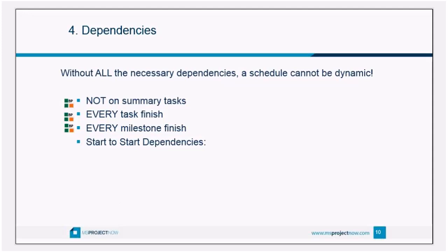You want to make sure that every finish date has a dependency on it. The only exception is summary tasks and the very last task in the schedule, which is typically a milestone that says 'project complete.' All finish dates of tasks and all finish dates of milestones must have a dependency. That's the only way you'll get a dynamic model of your project — if you want to see how a change in task two impacts task 30, your network has to be complete.